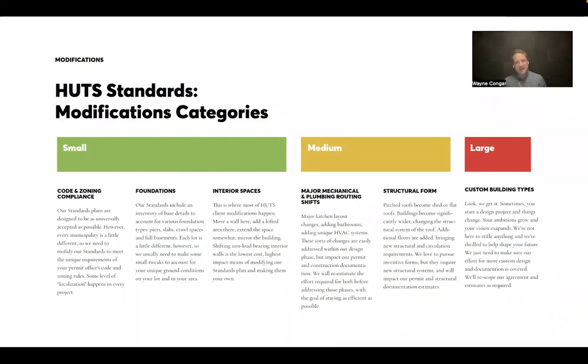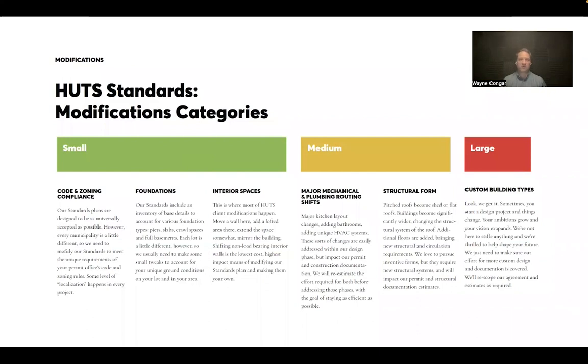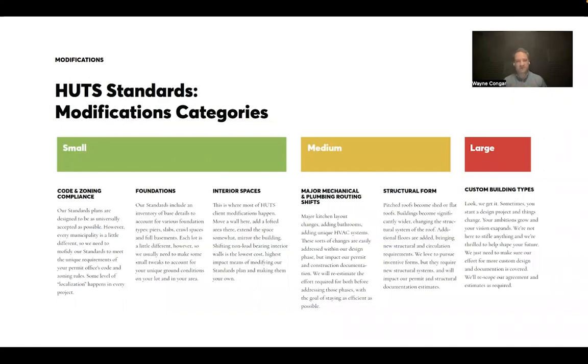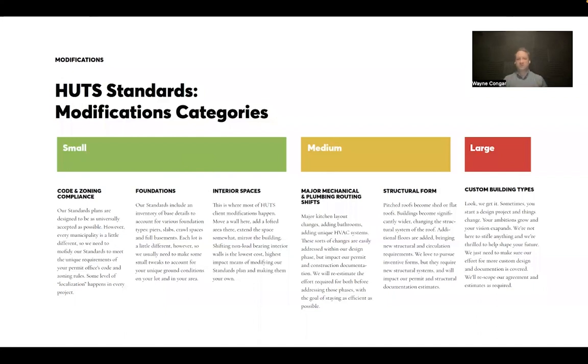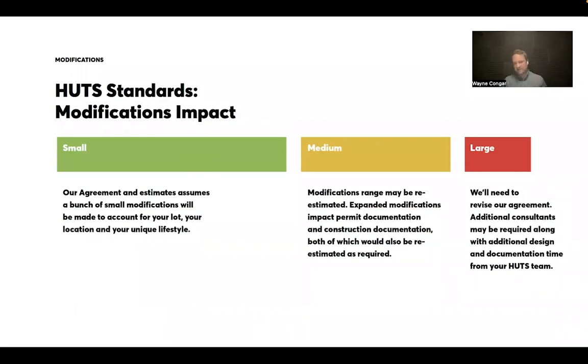On the medium side, again, major mechanical and plumbing shifts, significant changes to structural form, flat roofs, shed roofs, much wider buildings, different sort of forms overall will always have an impact on framing and structural condition. And so this is a spot where we're often able to utilize a lot of what we have as typical within our standards, but some of these structural pieces we need to revisit. And then large custom building types, kind of totally new sorts of spaces.